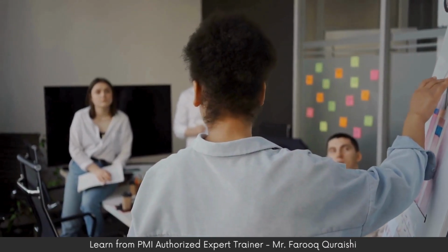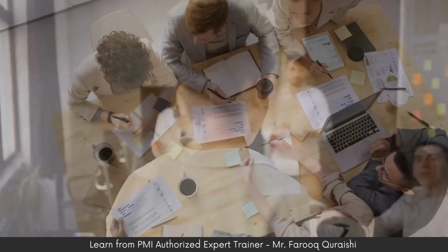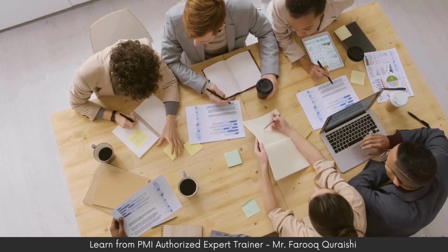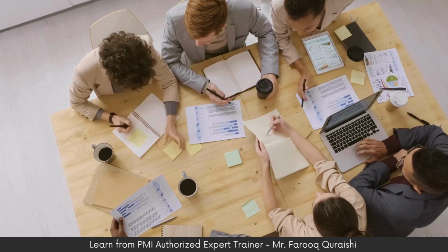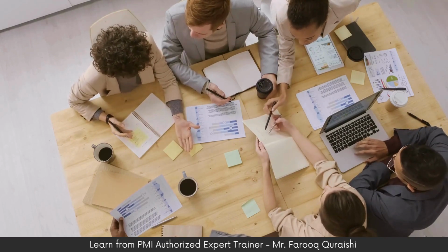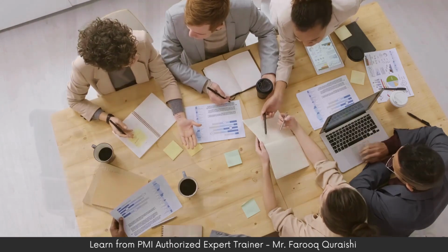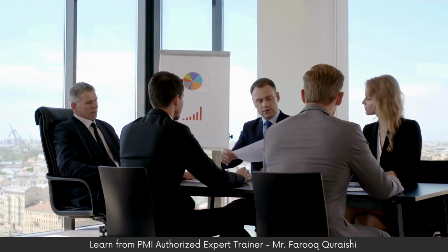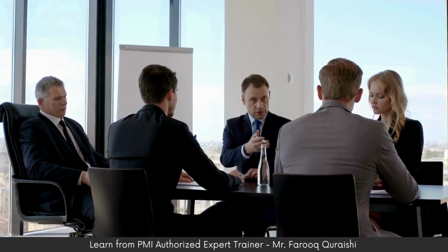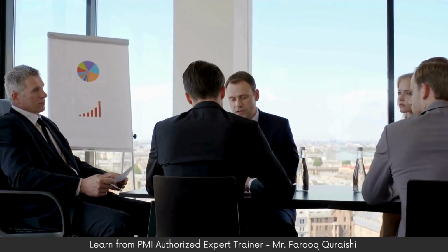And daily Scrum is a meeting that happens once in 24 hours, where the development team will have to attend, and the product owner and the Scrum master may also attend. This is also called the stand-up meeting. The team has to stand around the table, and everyone will get their turn to speak about three things: what I did today, what I will do tomorrow, and if there are any blockers, any constraints.